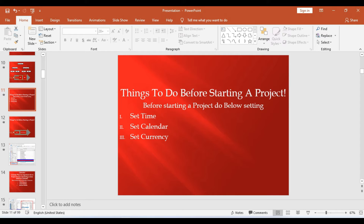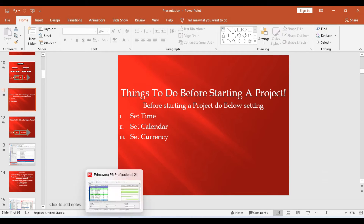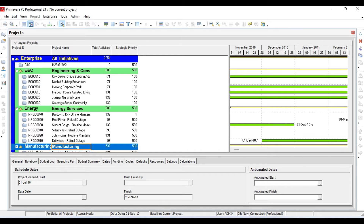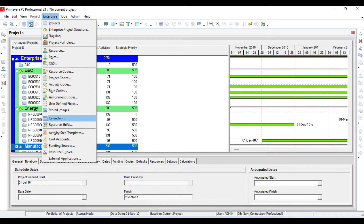First of all you have to set time, then you have to set currency, and then you have to set calendars. For setting time and currency, go to Edit then User Preferences. For calendars, go to Enterprise then Calendar. From here you can check, make a new calendar, and edit existing calendars.